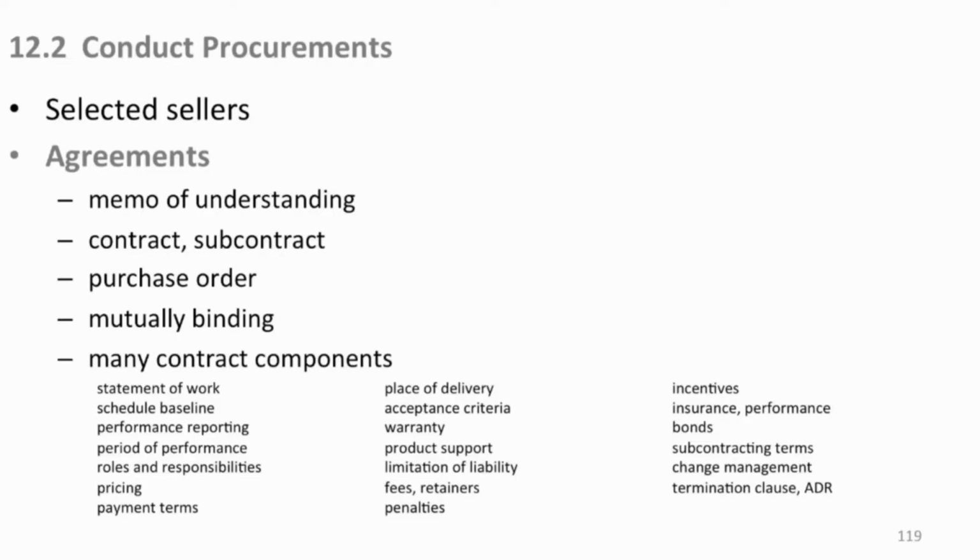Well, certainly for you it's going to be a change order through your change request system. It goes into procurement and they issue a change order. But how are they going to handle it on their end? You're going to have to get a bid from them to cover. Well, generally how it works is you send, here's a change request, change order, cost it for me. They'll give you the result. It would cost you this much.